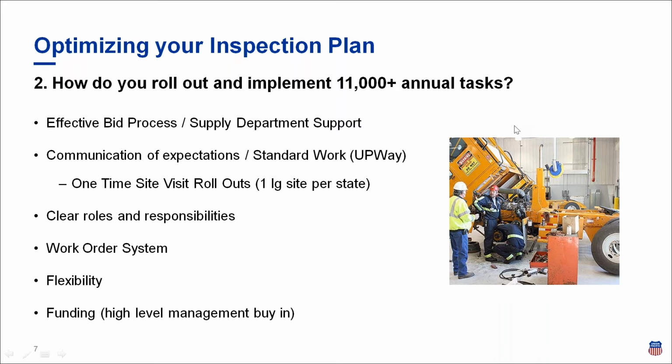Part of that standard work included a one-time site visit. So every single state, we operate in 23 states. Every single state, we required that the team, both the field, Omaha, and the contractors visit on site for 1 to 2 days and put faces to the names, build the relationship, but also show them things that are important to us, like our safety culture.